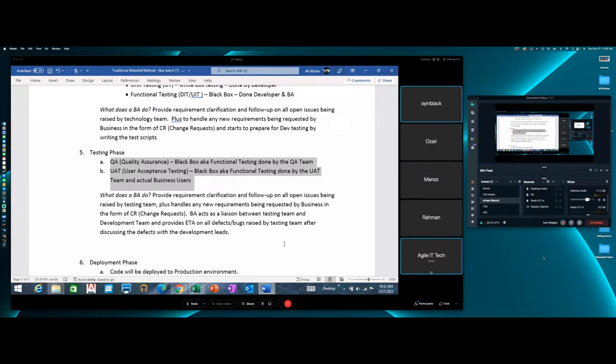So what could possibly happen in this scenario? First thing you got to do is see what the 4 critical defects are, right? Then make sure those defects are reproducible in the dev. Because remember, you tested in dev. If they are reproducible in dev, now you're in trouble. You understand? If I can reproduce a defect in QA and in dev, then you definitely missed it, right? Yes.